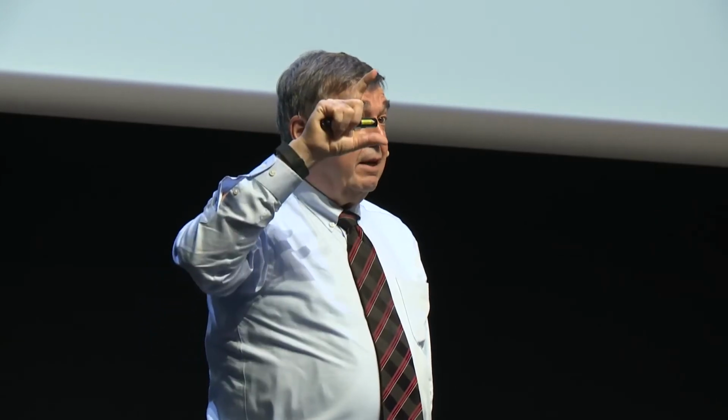We use phase gate processes, stage gate processes, where I have to finish one phase before I begin the other phase. And if you think of that from a batch size perspective, if I have to define 100% of requirements before I begin the design phase, that batch transfer between requirements and design is 100% of the work product, which is maximum theoretical batch size.